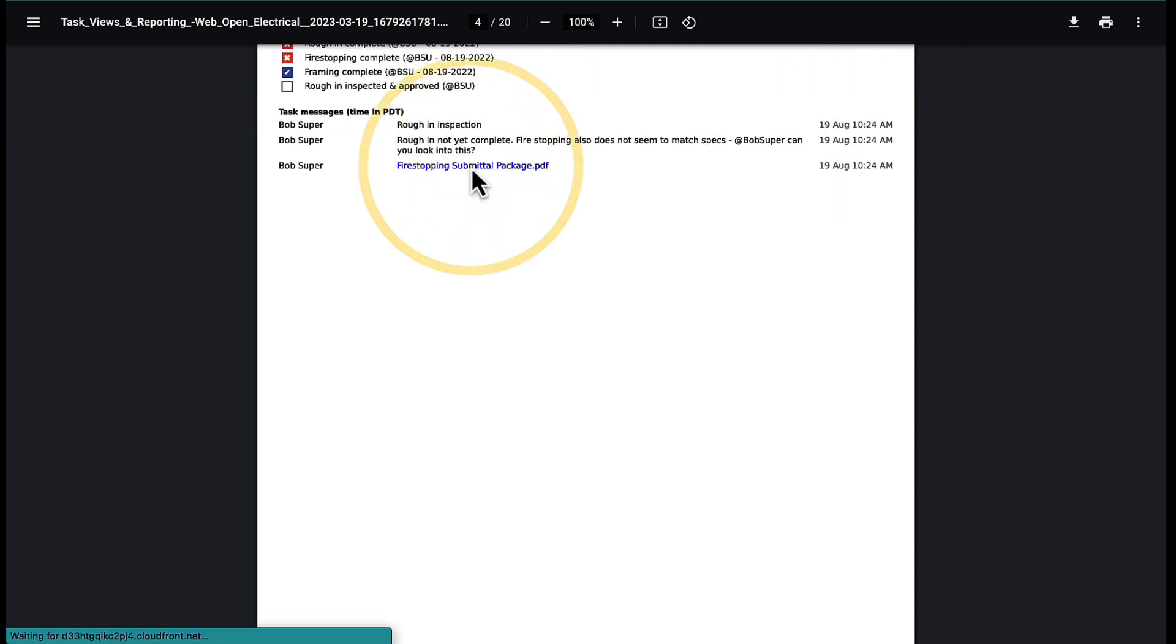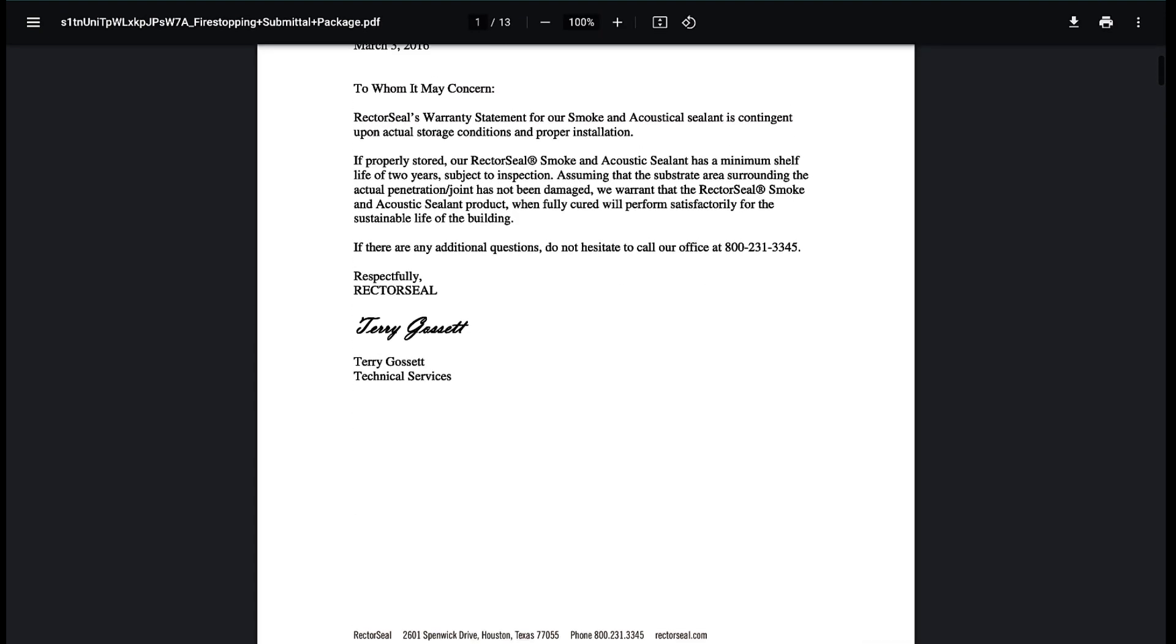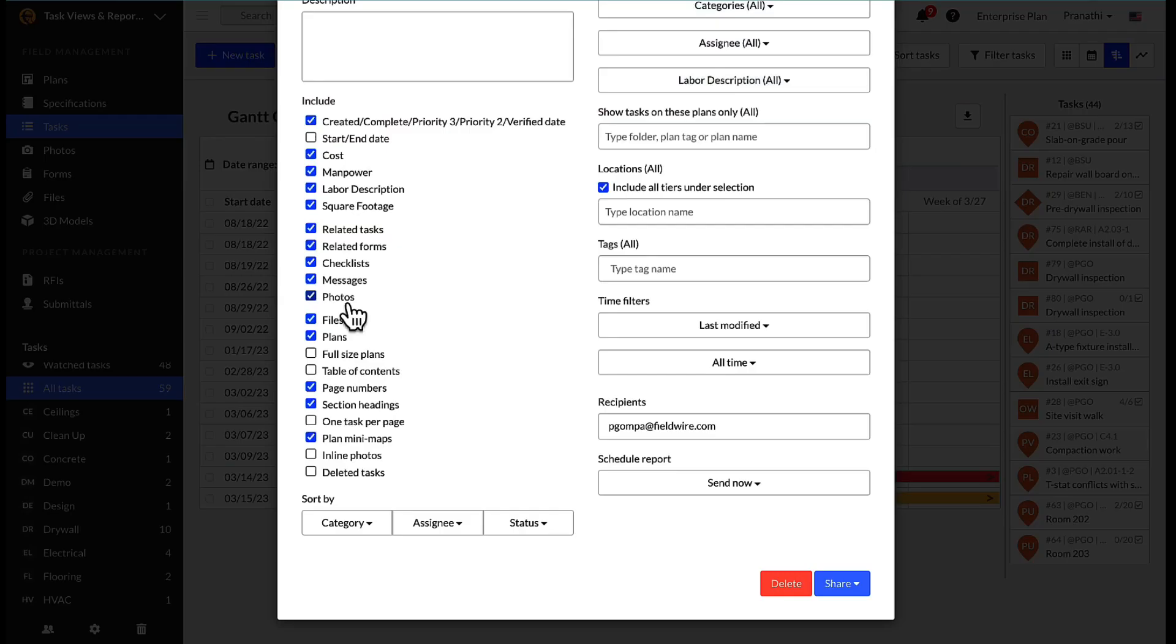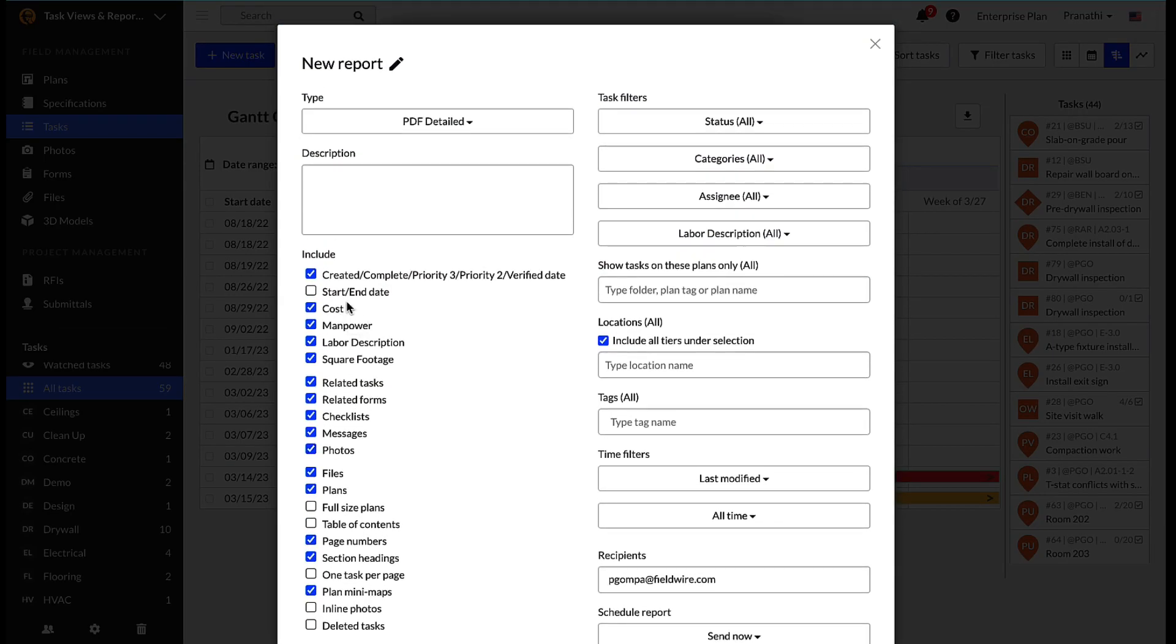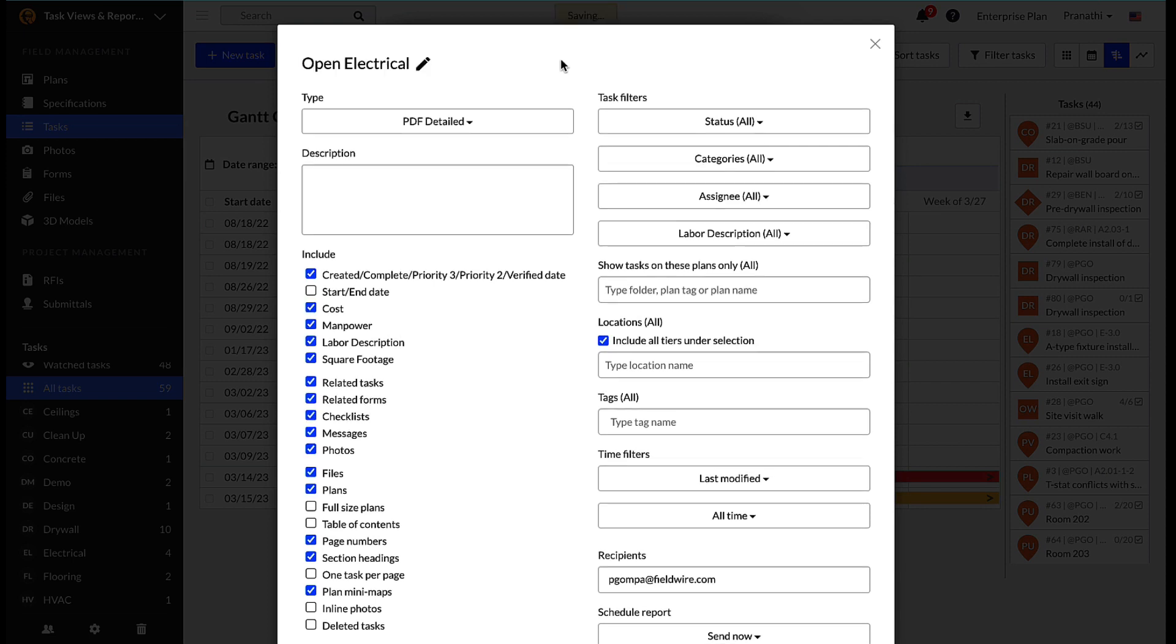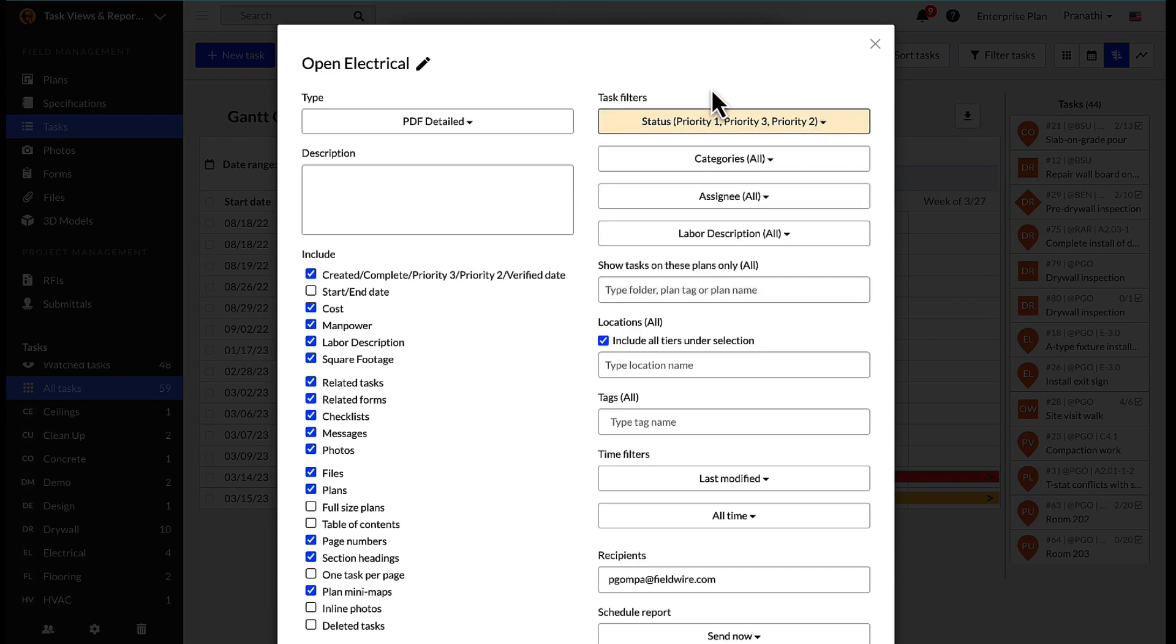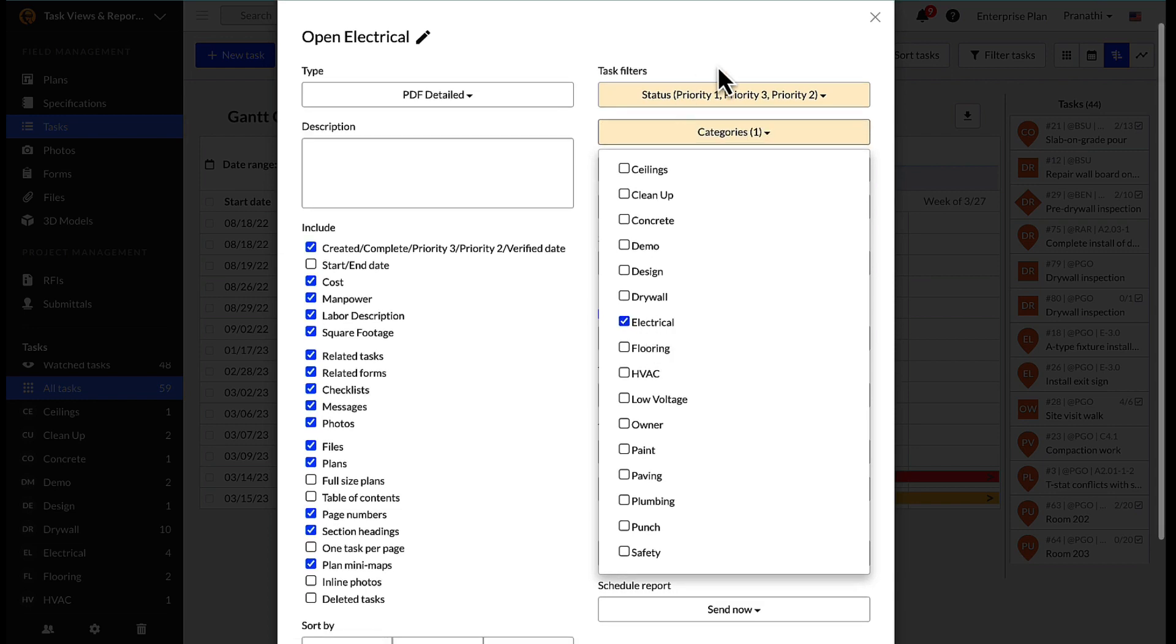Let's create a report to look at just the open electrical items on the project. Let's label it 'Open Electrical Report' and filter down the statuses to everything but the completed and verified task status. In addition, we'll select just our electrical category.